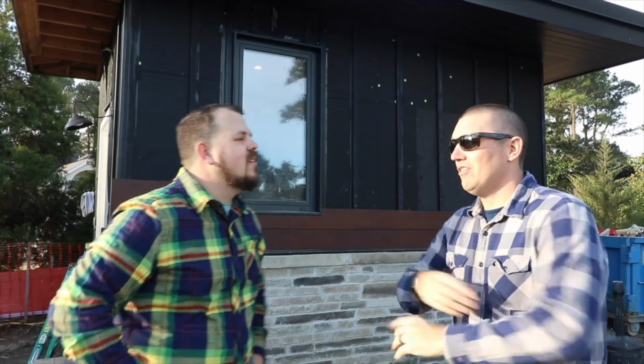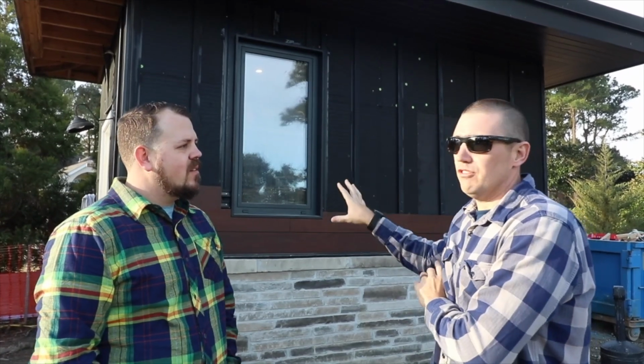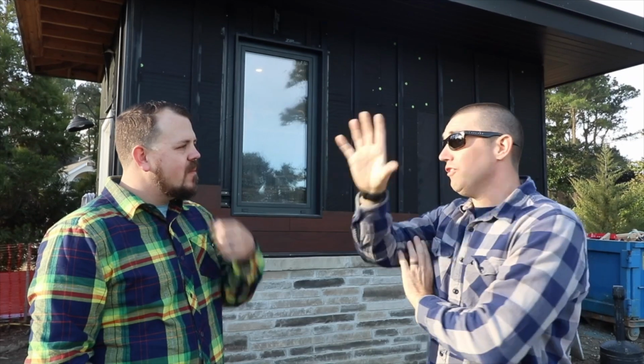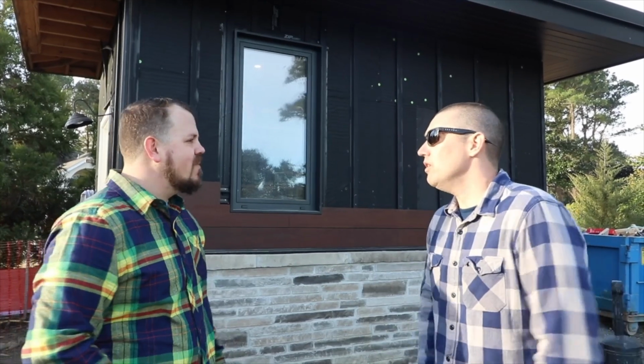We can have an office. We can put it in a location that it doesn't have to move, but it becomes a great place for us to do our mock-ups. Normally we're doing these on the structure as it's being built, where we're doing skirts and siding and window trims and all that. This allows us to do it way earlier in the design process. We can put this structure here and start looking at different materials before we even start construction on the house. So it gives our client and our design team a lot more time to really feel through the process.